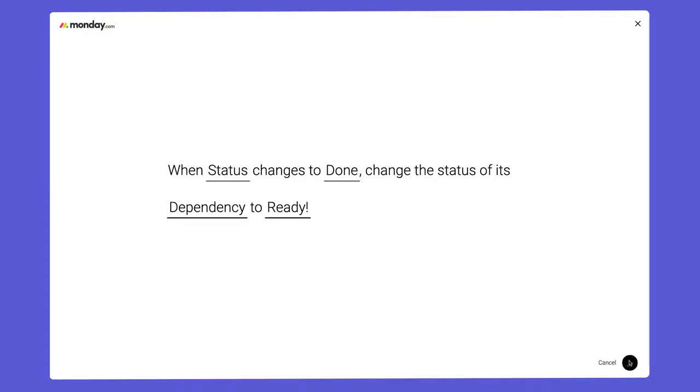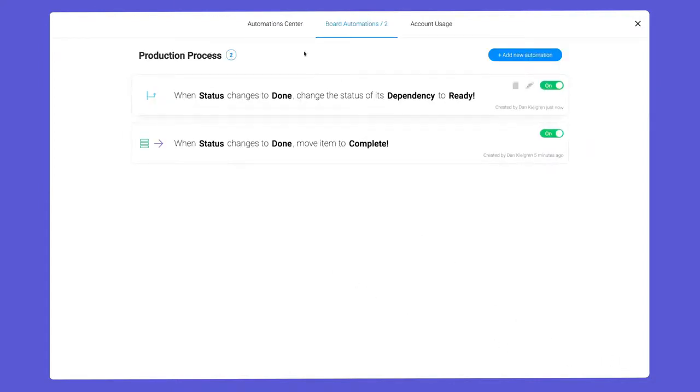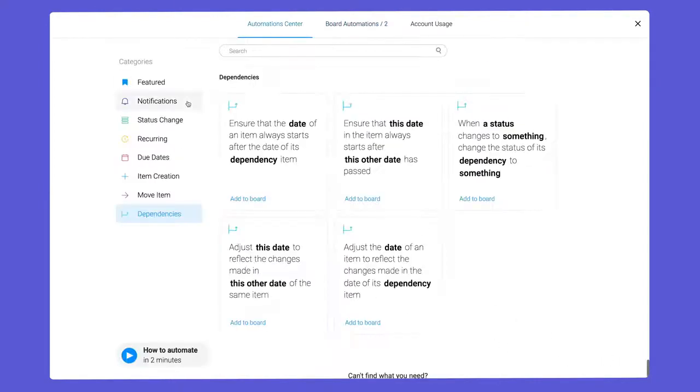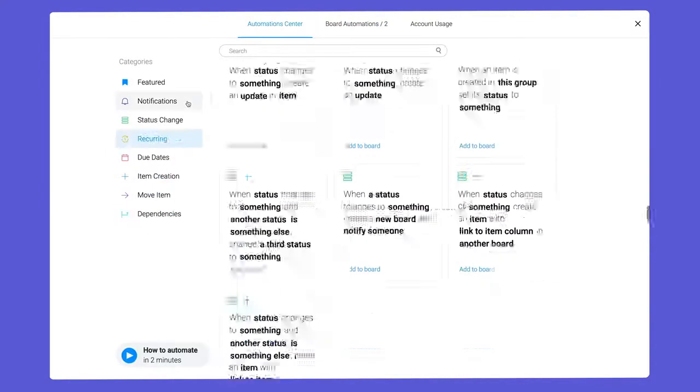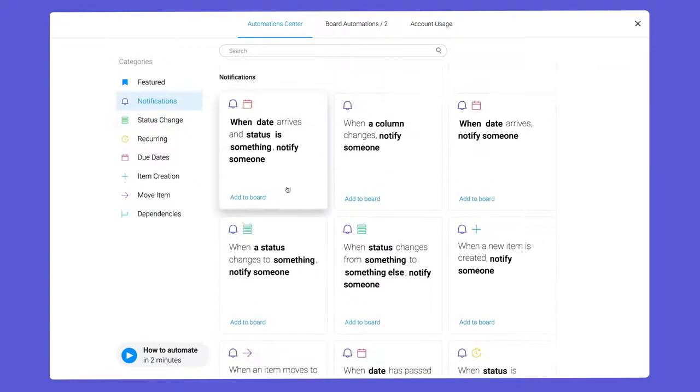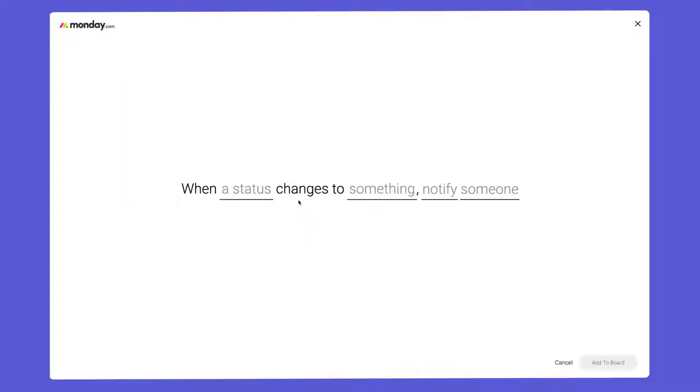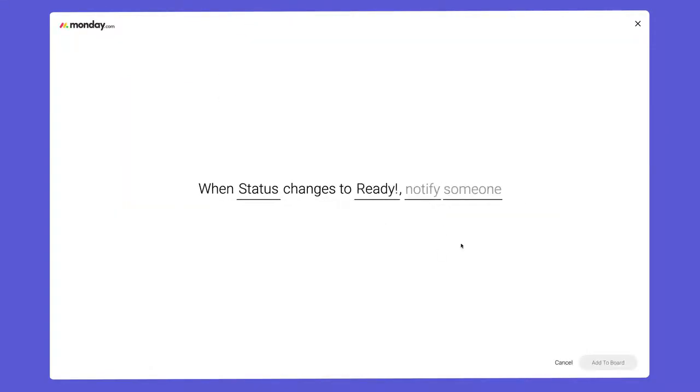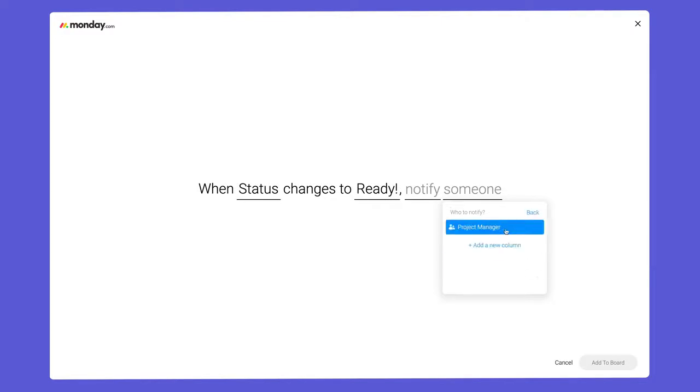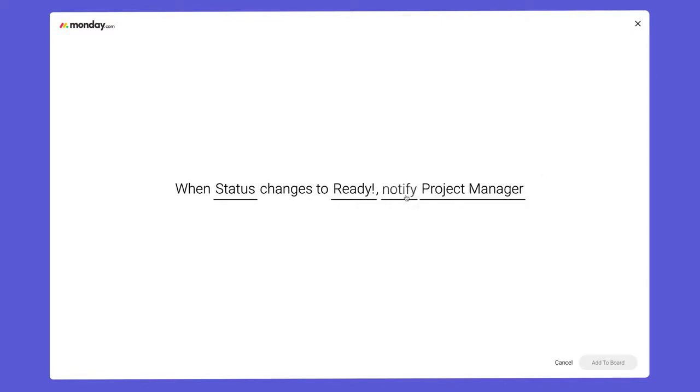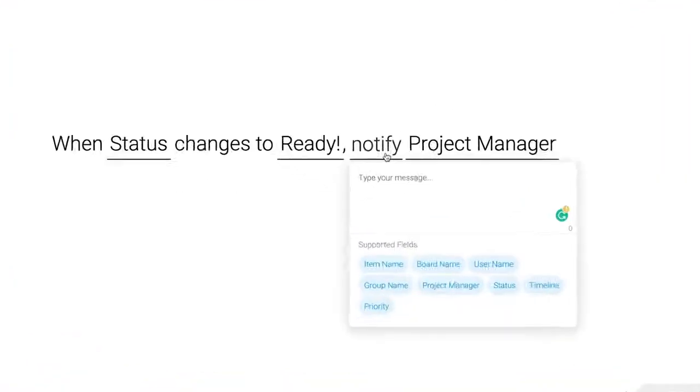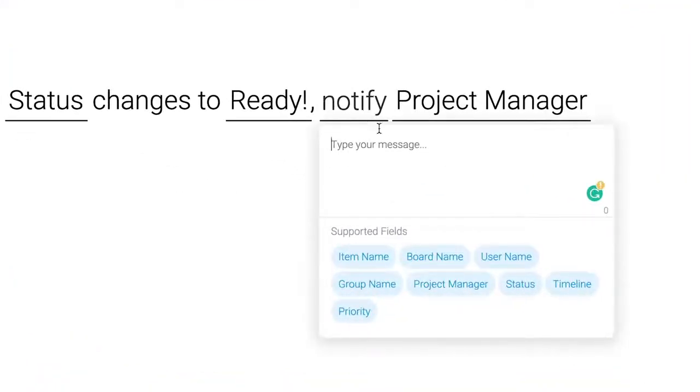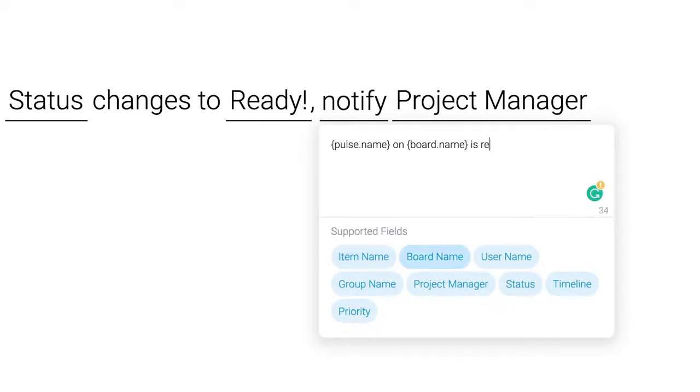Before we give this a go, let's take things one step further with a handy notification recipe. Here, we'll send a notification to the project manager when their task is ready to begin. With these dynamic fields, I can insert elements like item or board name into my message.